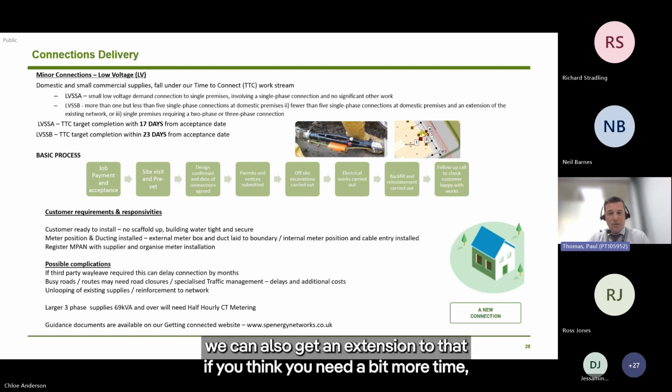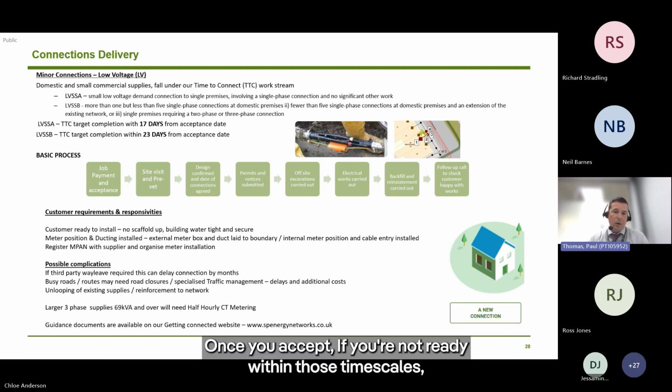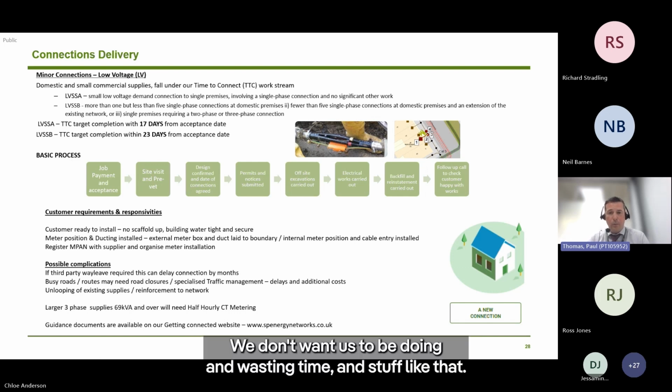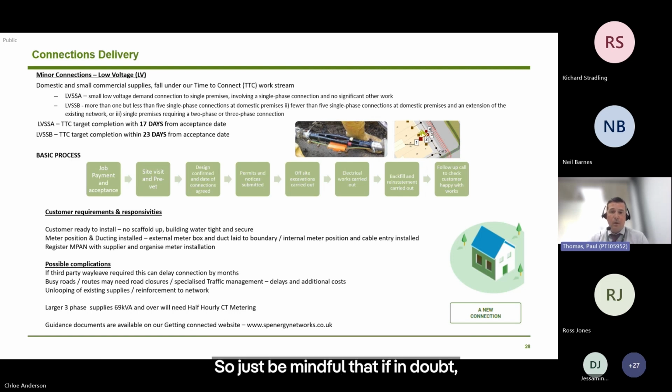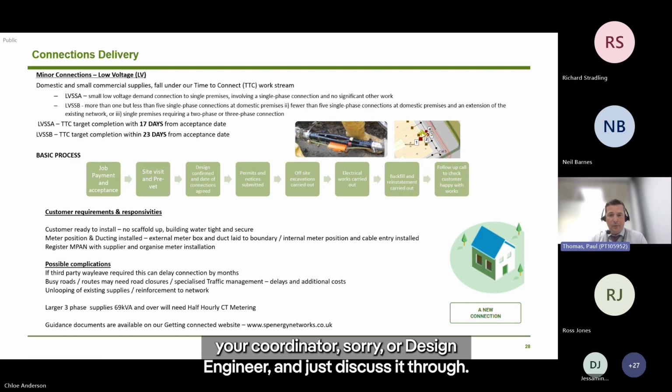We can also get an extension to that if you think you need a bit more time, but just be prudent. Once you accept, if you're not ready within those timescales, we may cancel the quotation, and then it'll have to go all the way back through the design process again, which we don't want you to do, and we don't want to be doing, wasting time. So just be mindful that if in doubt, ring one of the delivery heads or the design heads, or even your coordinator or design engineer, and just discuss it through.